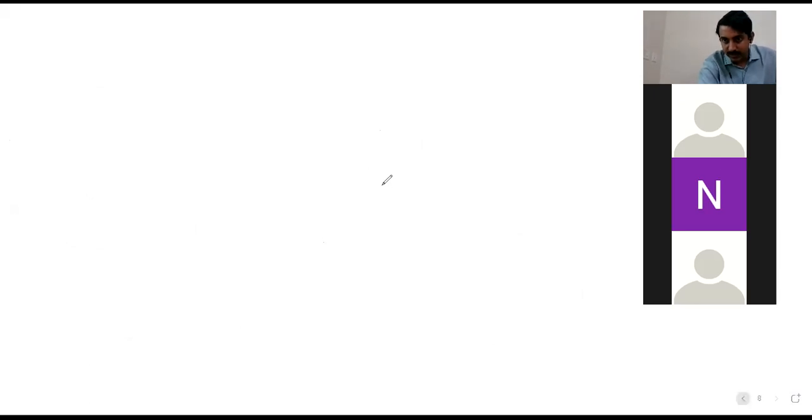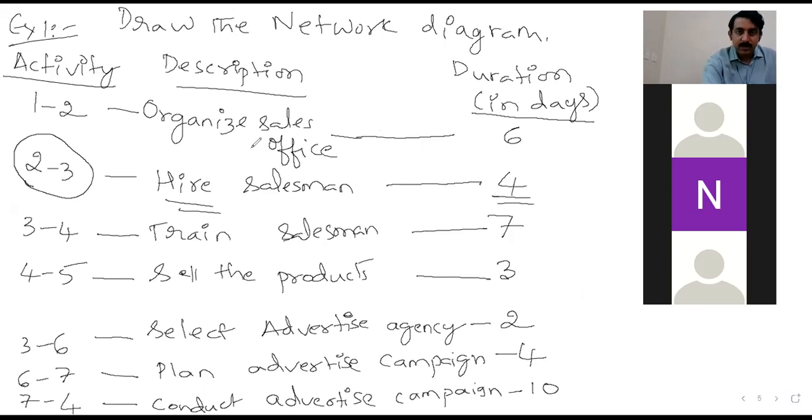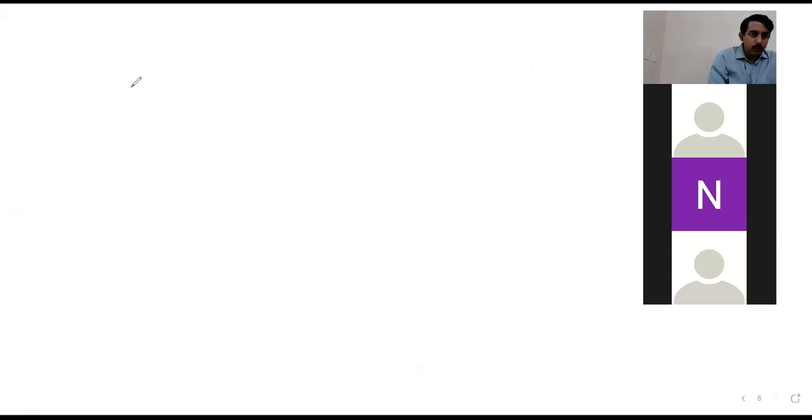What is the next activity once the hiring of salesman is done? Training of salesman, that's right, and it is taking 7 days time. And starting at the ending node of this activity, correct, node 4. So all in one line.